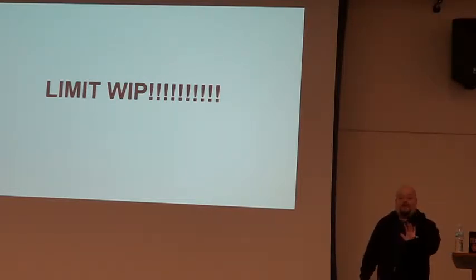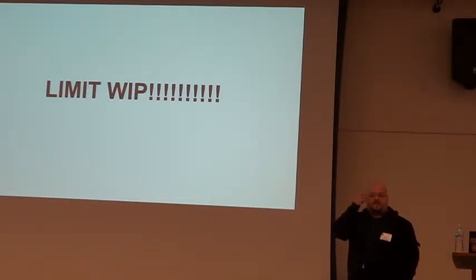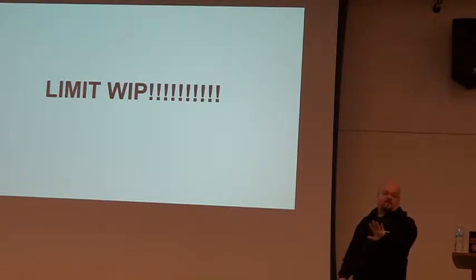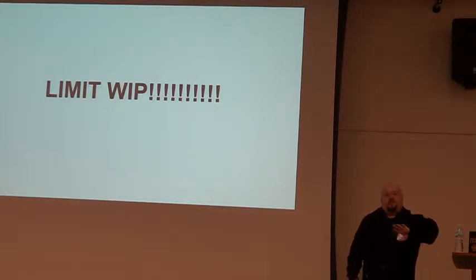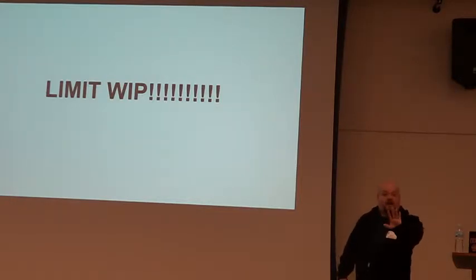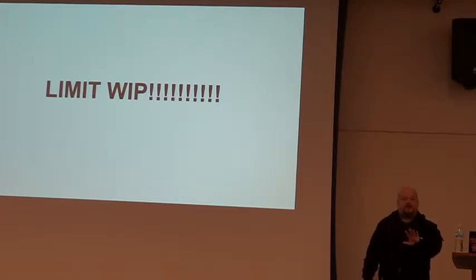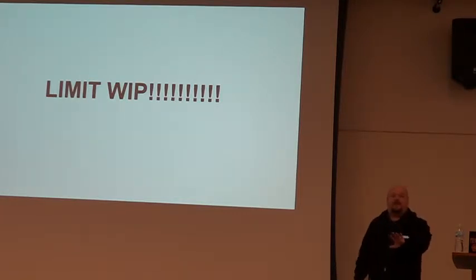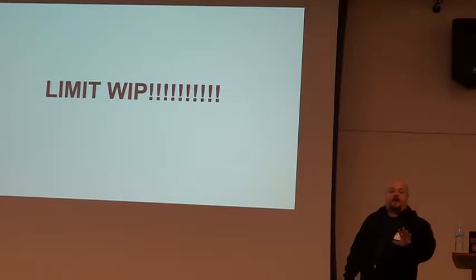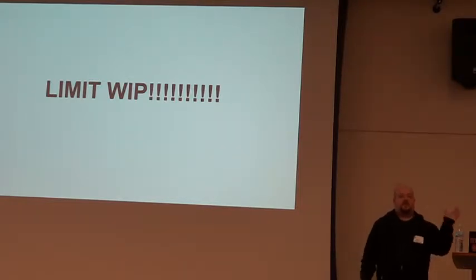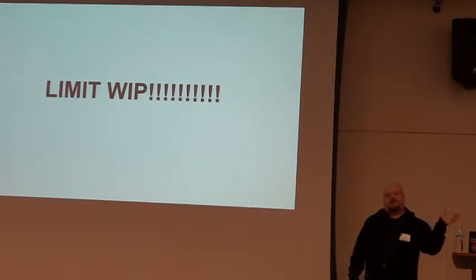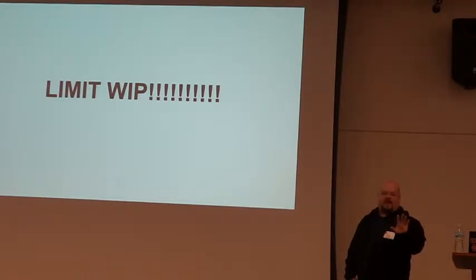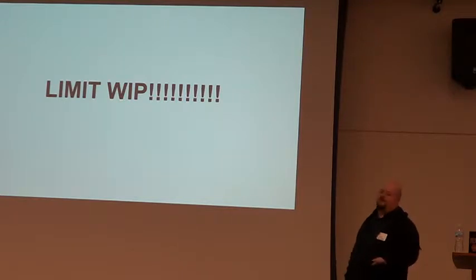We're only going to have five devs. You can only work on one thing at a time. So our working lane will be five cards long. If anything happens to a card in that lane where it's stuck, we don't just say, we'll go grab another one. Because that card has to move. And there has to be motivation and poking and prodding to get you to move that. You know what? You're stuck. You need to go get help. So we're not going to have this card laying around for a week at a time because, well, I haven't had a chance to talk to Johnny down the road who's the master of this and can help me unblock. No, no, no. Let's unblock this and move this along right now. There's less work wasted time.